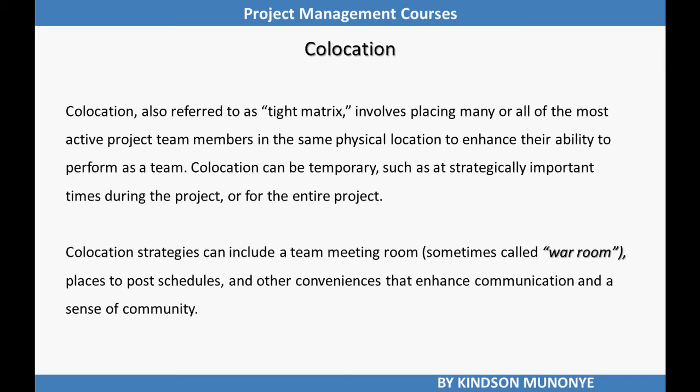Colocation can be temporary, such as at strategically important times during the project, or for the entire project. Colocation strategies can include a team meeting room, such as a war room. A war room is a team meeting room. According to the PMBOK Guide, this is where the team meets together, with places to post schedules and other conveniences that enhance communication and a sense of community.